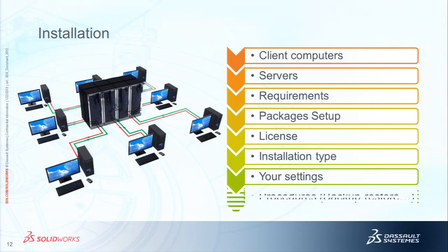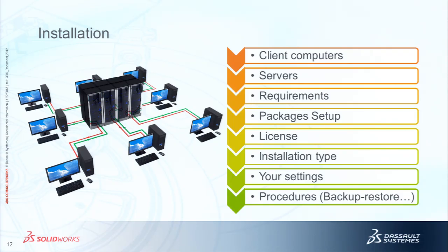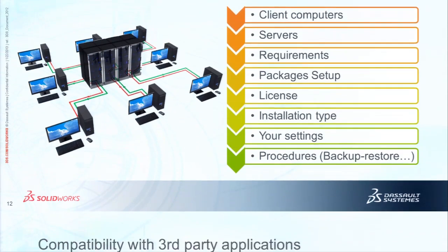And you need to test the procedure, and especially backup and restore. You always need the contingency when we are talking about backup. Make sure backup and restore works okay before your migration, and make sure they will be fine also when you have installed the new version, okay? You can't really afford a problem with the data, otherwise that may mean days and days of job lost.